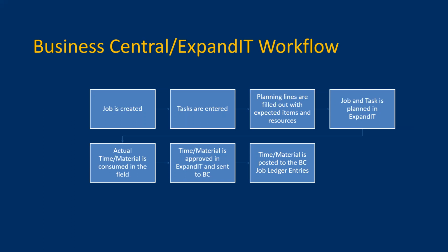Because there are more details on a job, the planning tab would need to be filled out to plan the resource for the date and time the resource is expected to be on the job site. From here, if you've seen our presentations, you're able to add coworkers, which are, again, any resources, meaning people, heavy equipment, trucks, anything that's needed to be scheduled to get the job done directly from the planning board. And then once that work order has been planned and it is a status of appointed or accepted, it's visible to the mobile device of the resource or resources assigned. So if they have reception, they can see it right away.